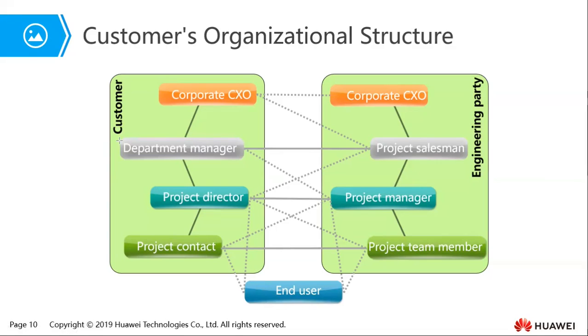We said that for the department manager, we can have the ICT director there. This is the vice chancellor, the CEO of the university. Here we have the ICT director. Then in the ICT directorate, we have a subdirectorate, the network and administration subdirectorate. So that person, the head of that subdirectorate, can act as the project director. Under his subdirectorate, he has some employees, for example, ICT support. So they're the ones that can now act as the project contact. So this guy is also a techie, by the way.